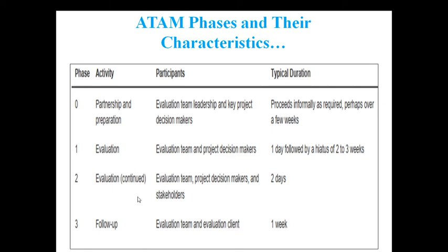Next, field evaluation. Along with the stakeholders, they will sit together for 2 days and verify whether each stakeholder is happy or not. Next, they will follow up. Finally, the last phase is the follow-up phase. They will try to prepare a report and give it within a week. With this final report, they will conclude what problems we have, how we have to solve them, whether any changes are needed in our project, how to satisfy the customer, and how many days it will require to change if needed. All things are discussed in this month.